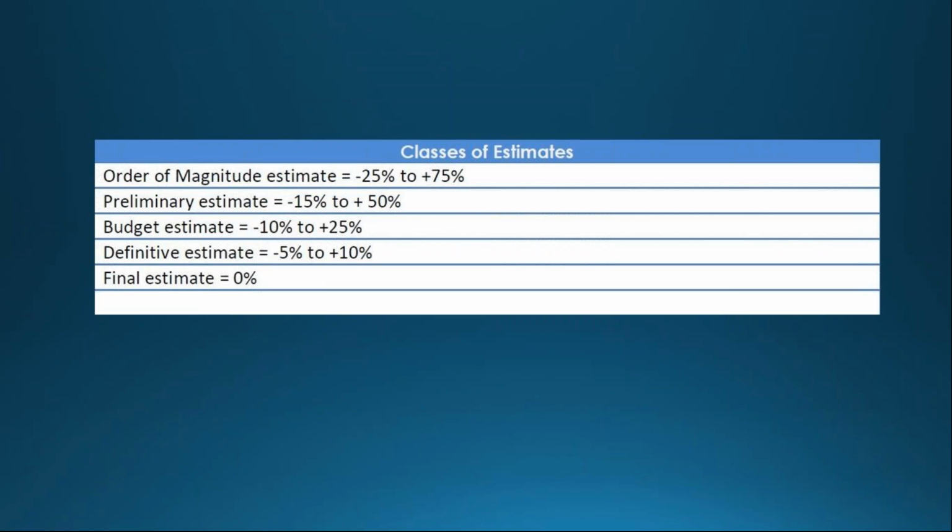And I see that a definite estimate, for example -5 to +10, is a really good place to be, because you think about you're also going to do contingencies on top of things. So you get the definite estimate. That's pretty good. I'd say in that range, maybe the one above it. It depends on how antsy your bosses are.